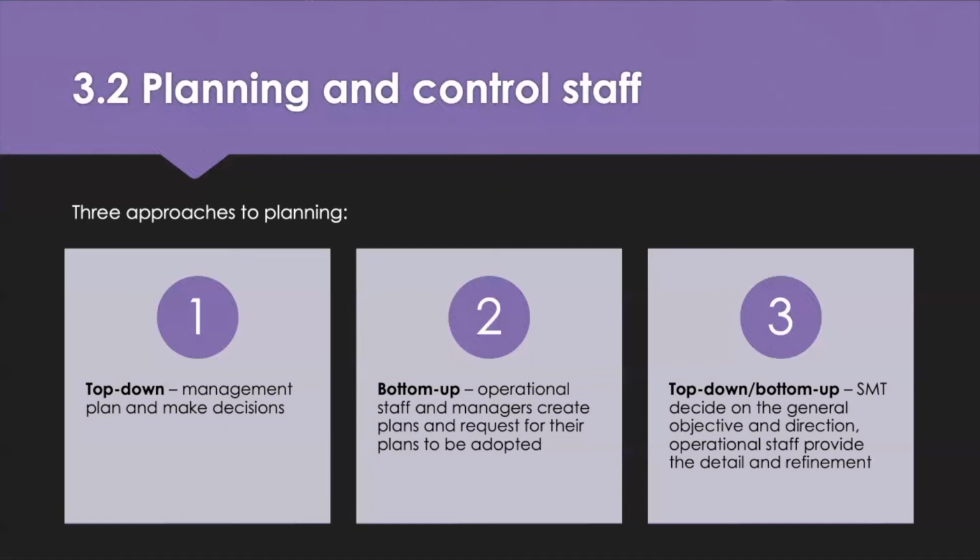So this consultation pattern may also be extended to suppliers or even customers, where changes proposed could affect the supply network members. But lower level decisions may be made by those planning or implementing a plan, and they perhaps don't have significant cost, time implications, or changes of objective. And referrals to senior managers would normally be expected where there is a significant deviation from the plan or the overall objective.